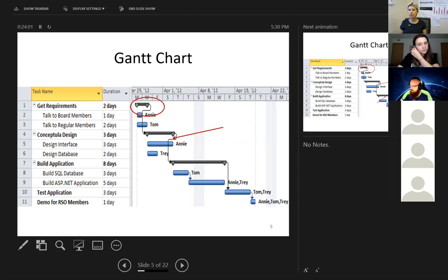Exactly. Right? So sometimes you need an outcome of another activity or another phase. You need flour to make something. So you have to wait for somebody to purchase the flour before you can start making the dough. That's a really good response. One type of dependency is called outcome dependency. You need an outcome of another activity. Purchasing flour is one activity. What comes out of that is flour. You need that to start creating your dough.